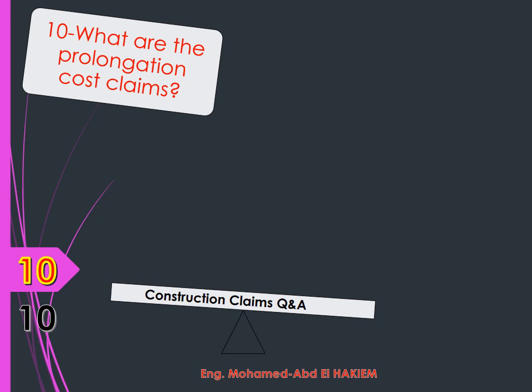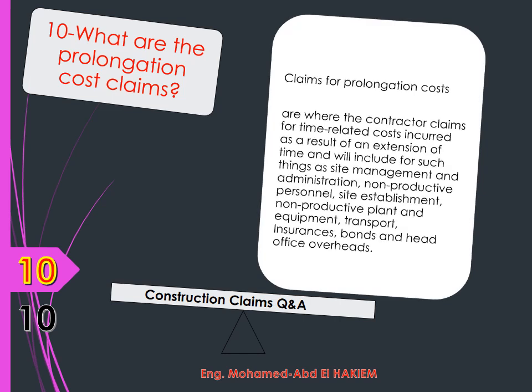Question 10: What are the prolongation cost claims? Answer: Claims for prolongation costs are where the contractor claims for time-related costs incurred as a result of an extension of time, and will include such items as site management and administration, non-productive personnel, site establishment, non-productive plant and equipment, transport, insurances, bonds, and head office overheads.